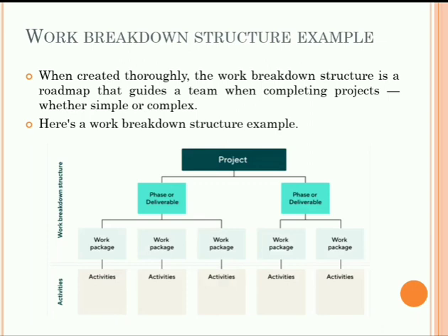It consists of including 100% of the work that is defined by the project scope, which is divided into work breakdown levels that contain control accounts, project deliverables, work packages and tasks. This rule applies to all the levels of the work breakdown structure. So the sum of the work at a lower work breakdown structure level must be equal to 100% of the work represented by the work breakdown structure level above it. It is without exception. This is something you have to keep in mind.